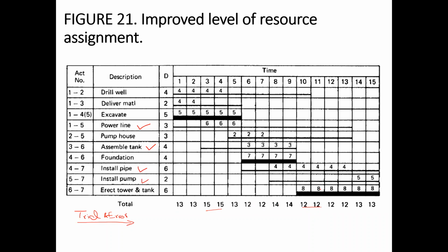So the resource leveling can be within the available float, and it can also be outside of the total float. If it is outside of the total float, then the duration of the project will also be delayed. All right, so that was the resource leveling. Any questions?